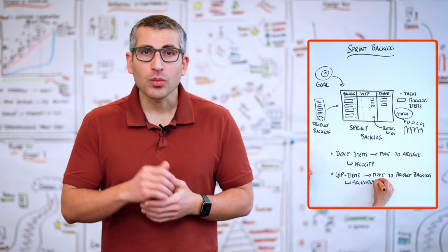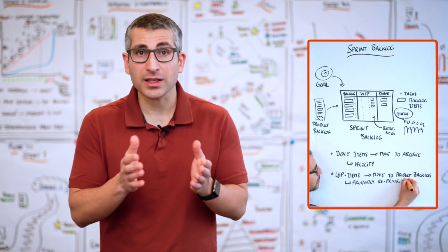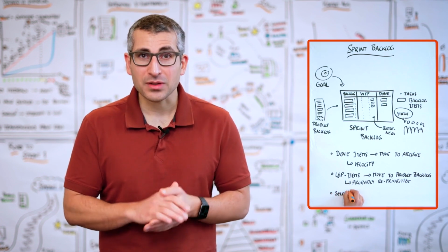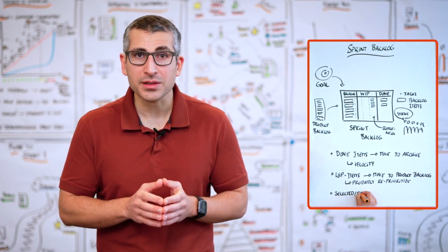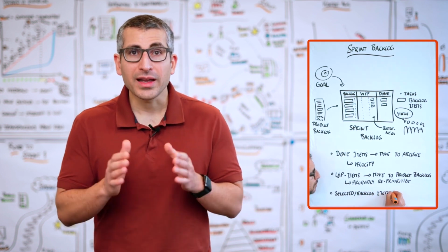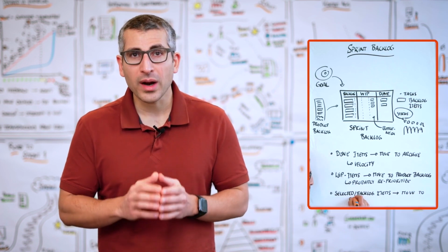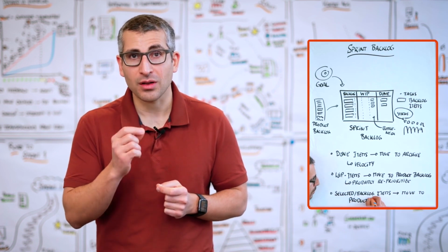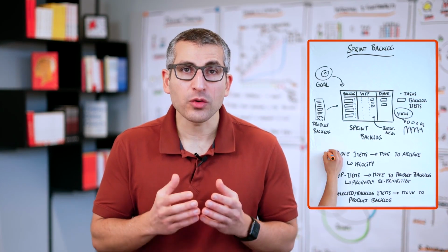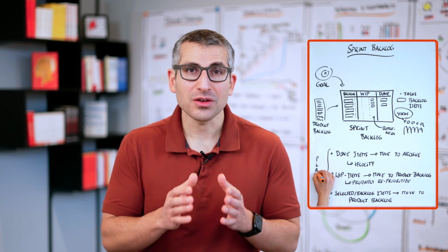Last but not least, we take a look at the column on the far left. Anything we had selected for that sprint, but we didn't even get to start with those. And that's fairly simple. Similar to everything that was in progress, we also move these items into the product backlog. And there, again, it is at the discretion of the product owner to determine where they want to position those items. Once we have cleaned up our sprint backlog, we are prepared, we are ready for our next sprint planning. And then everything starts from the beginning.